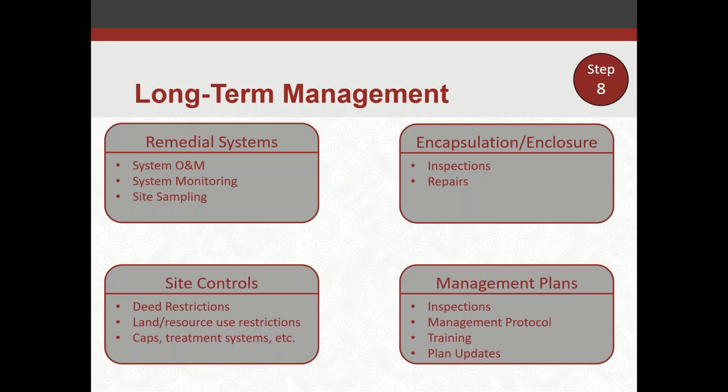Site controls, you might have deed restrictions, so you can't use the land or the property in a certain manner. It might just be a restricted industrial commercial use, and you can't ever use it for residential, so that's going to go with the deed. It's important to know that and transfer that with the property and make sure the next owners are aware of those conditions.